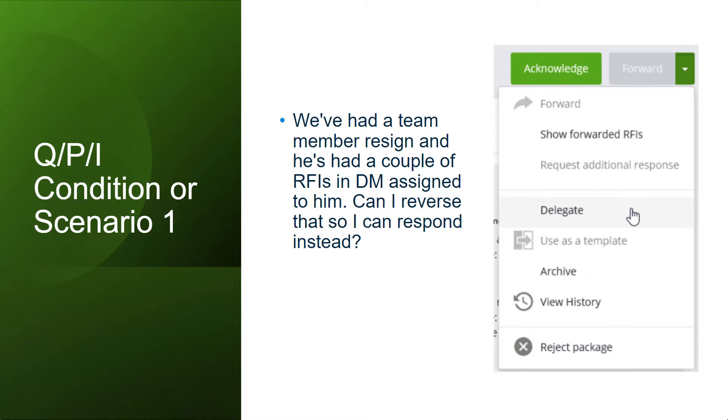Open the RFI packages sent to the colleague that left your company and on the right hand side under the forward drop down, as you can see in the snapshot, click on delegate option. Then select yourself as a delegate recipient and confirm the delegation. You will become the recipient that needs to respond to the RFI then.